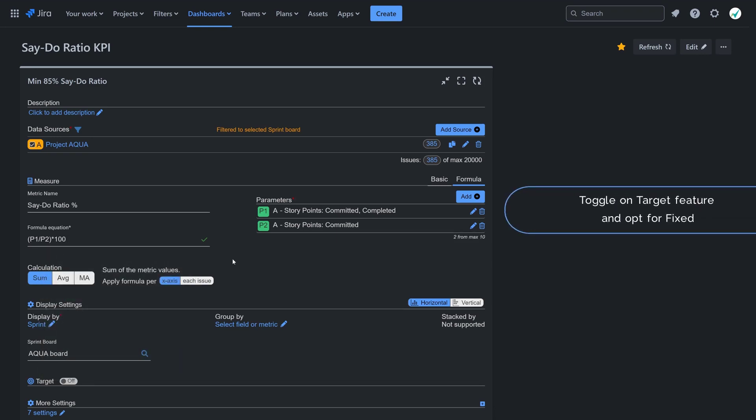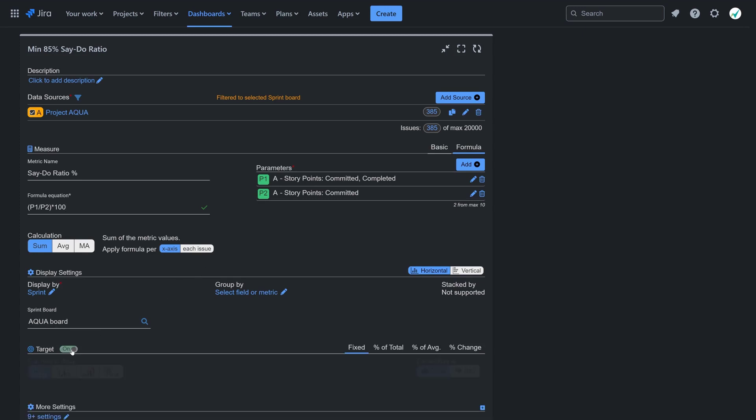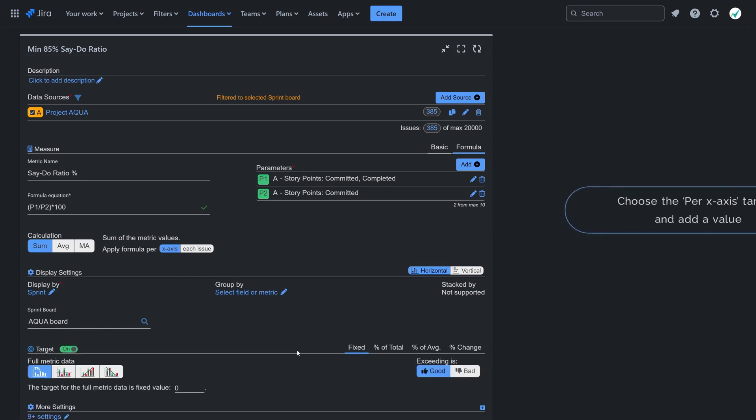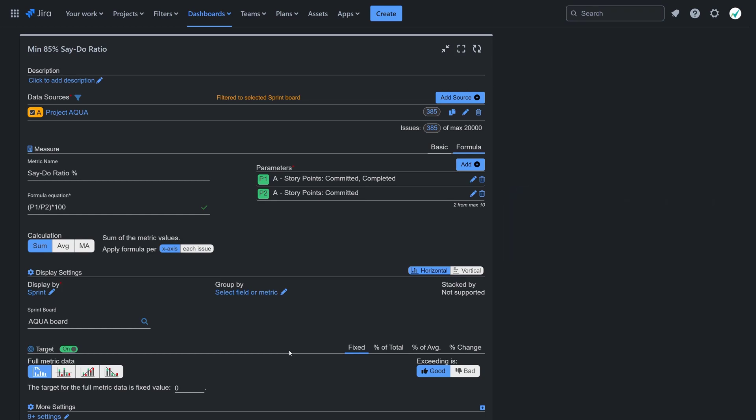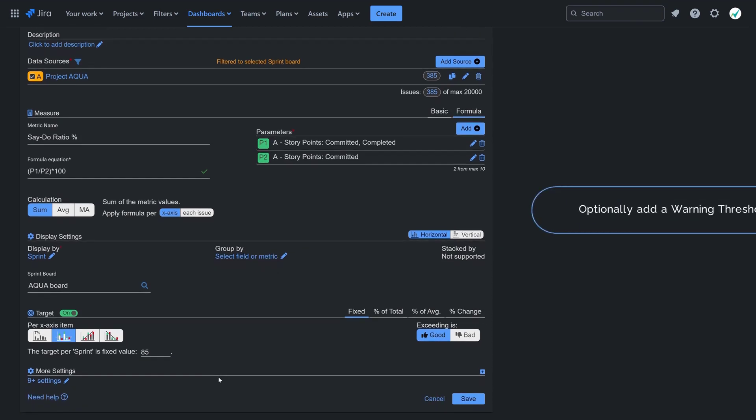Head to the target section and stick to the fixed target type. Opt for per x-axis target results and set your desired target value for the Say-Do Ratio. Optionally, include a warning threshold.